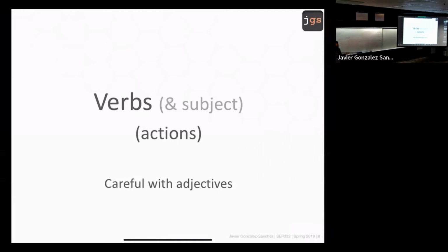And sometimes adjectives like fast or beautiful are not clear. They are not negotiable because we do not understand the same thing, or they could be hard to test. If we do not agree, what are we going to measure with this beautiful or fast? We need to put numbers to them.